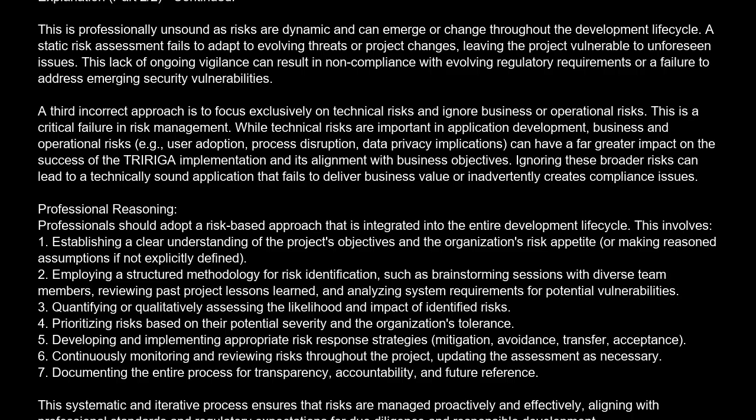Professional reasoning. Professionals should adopt a risk-based approach that is integrated into the entire development lifecycle. This involves: 1. Establishing a clear understanding of the project's objectives and the organization's risk appetite, or making reasoned assumptions if not explicitly defined. 2. Employing a structured methodology for risk identification, such as brainstorming sessions with diverse team members, reviewing past project lessons learned, and analyzing system requirements for potential vulnerabilities.